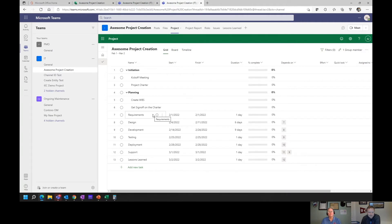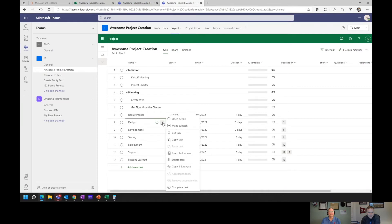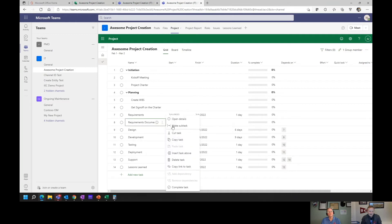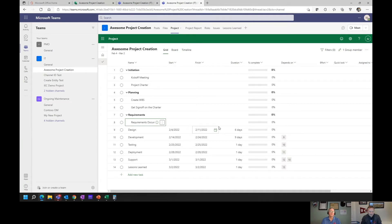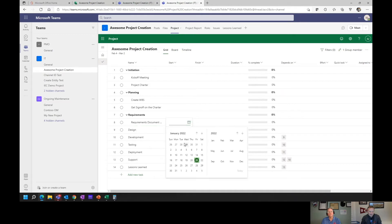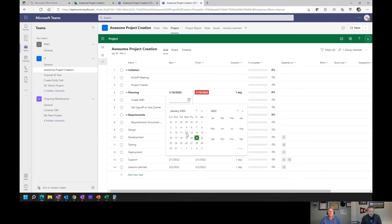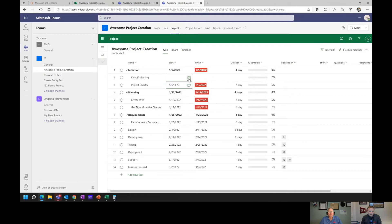Here's Project for the Web — just a brief demonstration for those who may not have seen it. I can insert tasks above one another, create tasks by just typing. I've got my requirements document creation task, and I can indent it to make it a subtask of something else. You can go many levels down into subtasks. I can give it a start date — say the 25th — and the summary task displays that. As I complete my little plan, it shows that some tasks are already late, making it very easy to understand what's going on.